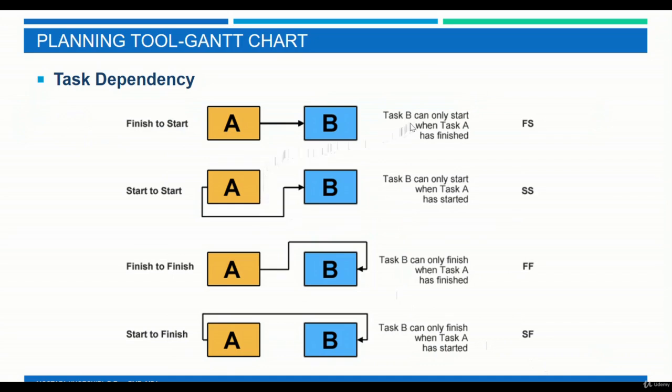So if you look here, we have finish to start, the one that we just did: task B can only start when task A has finished. To give you an example for finish to start, we cannot start digging a pit without buying a spade. That's one example for finish to start, and we saw the example in our own project as well.